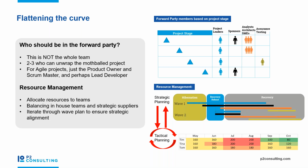If it's in delivery or in the early stages, then sponsors will be key at this stage. And you might have architects and analysts important at the early stages. You're not likely to bring in all your developers and other people at this stage, but there might be some assurance people you need if you're just about to go into the testing phases. If you're on an agile project, you may well have the product owner, scrum master, perhaps the lead developer form this forward party. So the key point is that it's just a small assembled bunch of people who can stand up the rest of the project and set up the resource plan for everyone else.